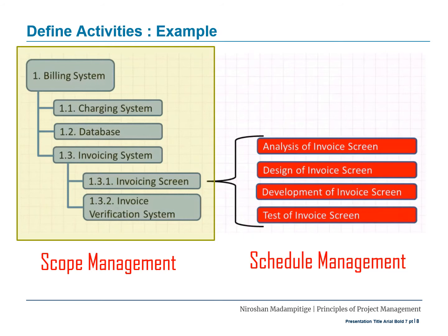We will plan all these activities to develop the invoicing screen. The invoicing screen is defined as a work package, and that is done in scope management. Defining the activities to develop the invoicing screen is what we do during schedule management. Hope this is clear for you.